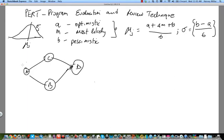So for each of those, we would need estimates of the times. So if we use the notation A and B for each one of those, we would say five, which is an example, five, seven, and ten. So that would mean five days optimistic, seven days most likely, ten days pessimistic. Four, four, and six. Optimistic is four, most likely is four, but pessimistic is six. That means somehow we can't do better than four is what has been suggested here. In this case, we could say eight, ten, twelve. You could equally distribute it around a ten, and three, five, seven, and so forth.